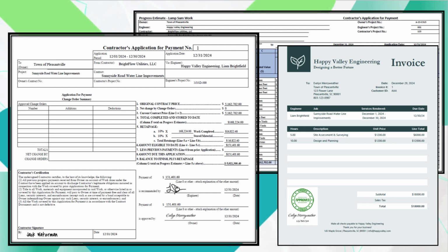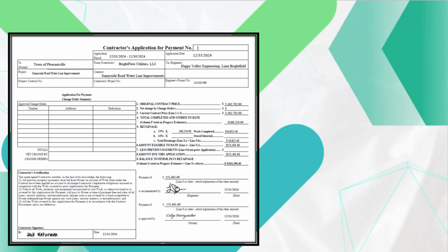You will want to ensure the pay apps and invoices are thoroughly reviewed and approved by the engineer and your local financial staff, including those who review budgets and payments. Approvals should be marked on the invoices and include approval dates. For this example, it has been determined that SCIP funds will be drawn first to ensure federal deadlines are met. However, the grantee must ensure that there is adequate documentation available for review that confirms match dollars are also being spent. Let's see how this information translates onto the RFP form.